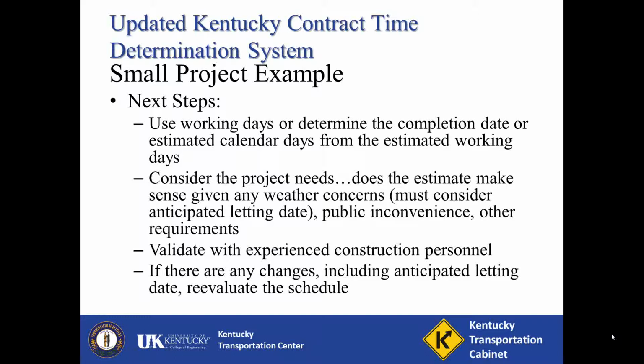Also reconsider the project needs. Does the estimate make sense given any weather concerns, especially in terms of the anticipated letting date, public inconvenience, or other requirements? Always validate the contract time estimate and proposed contract time method with experienced construction personnel. And if there are ever any changes, such as changes in the anticipated letting date, re-evaluate the schedule.